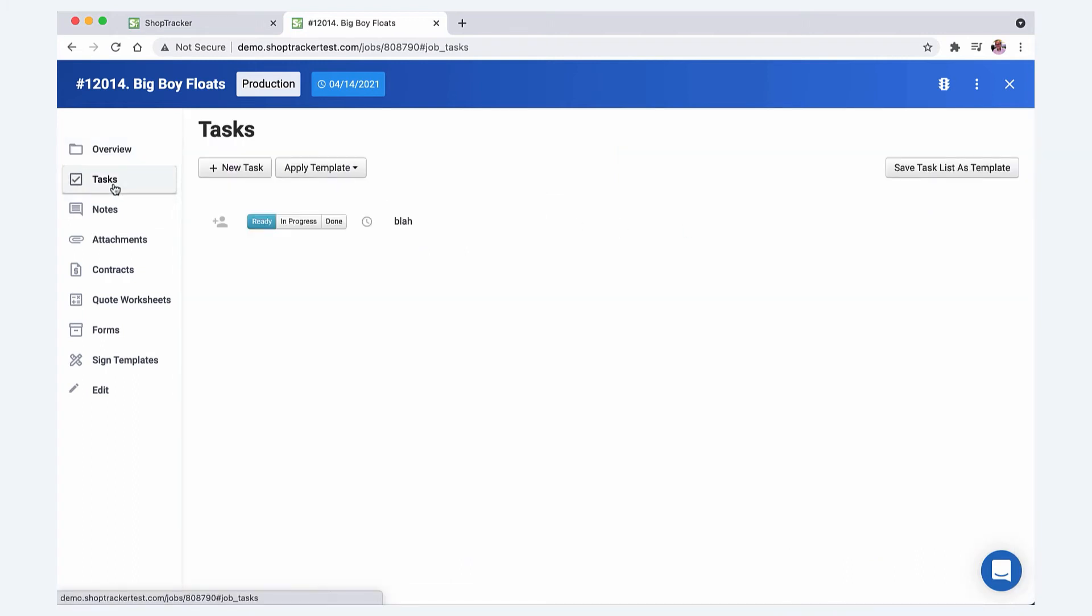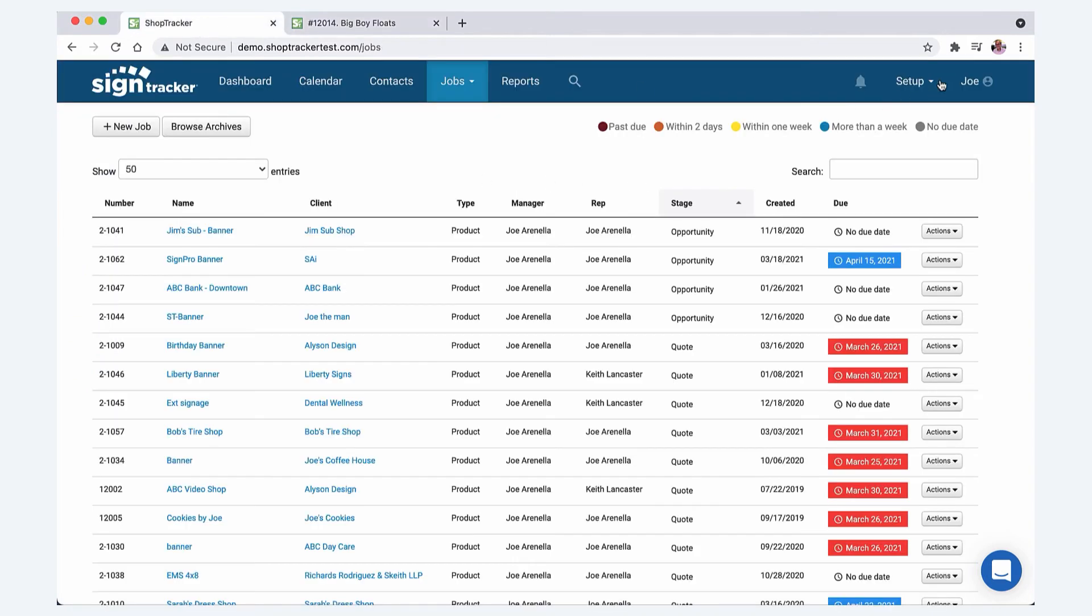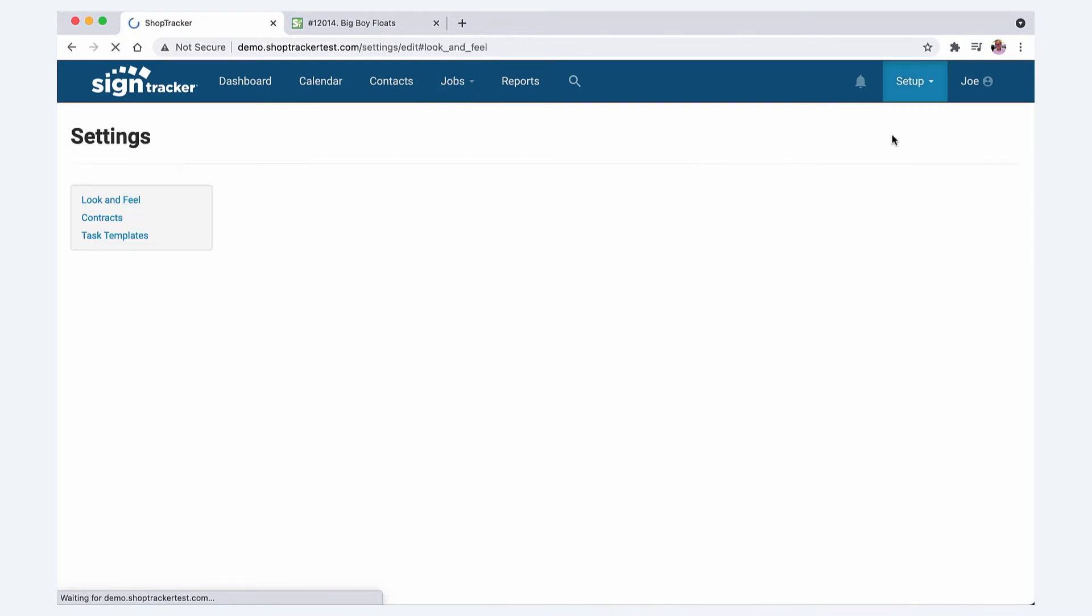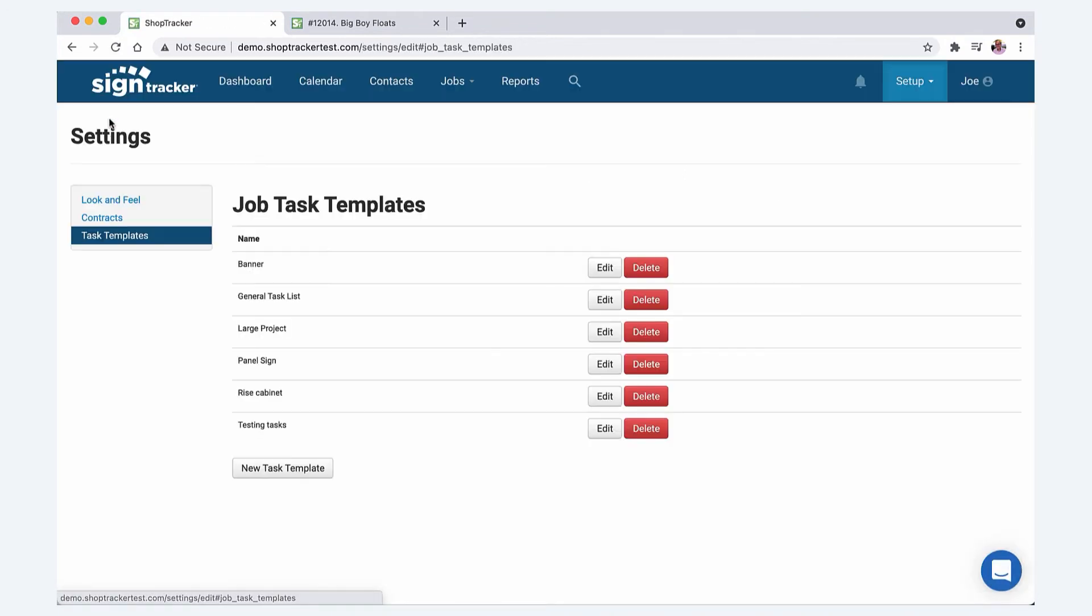Tasks. So tasks are template driven. You can watch some videos on how to set these up, but it's in the settings tab. If you're here, just go to setup settings and you have your task templates here. They're really easy to set up, just new task template and just fill in the list. If you need a list, some sample lists of tasks for different job types, shoot me an email, joe@sign-tracker.com and I'll shoot you an Excel spreadsheet with some task list samples.